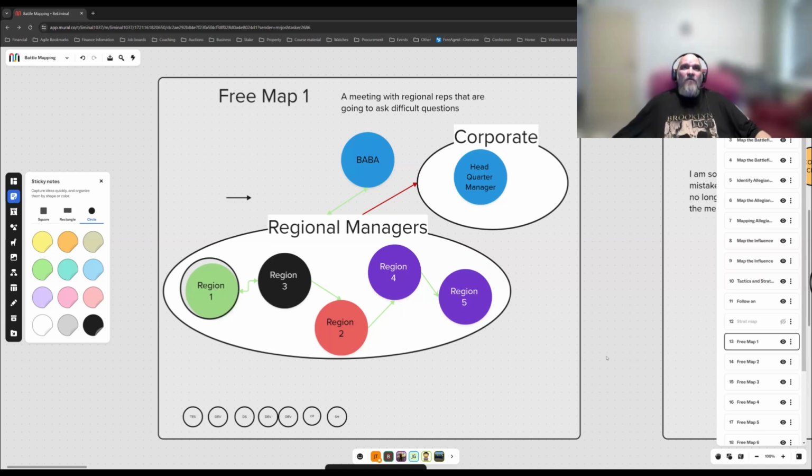We came up with 2 tactics. One was preemptively to get somebody that you know and almost do a canned session with them where they could challenge your points of view, so that you could identify any weaknesses or any points that might be raised. So that was tactic number 1.